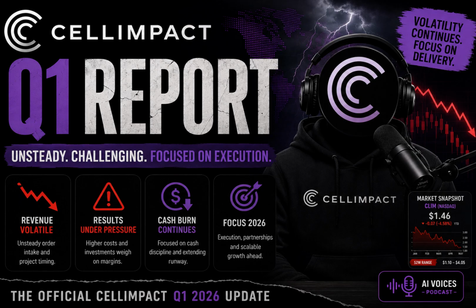It is. They uncoupled the payment for the preparatory engineering from the payment for the physical flow plates. And by doing so, they traded a frozen 18 million SEK contract for an immediate liquid 6 million SEK cash injection. And the brilliance of it is that they didn't even lose the client. The report explicitly notes they still have a shared ambition to deliver the actual flow plates at the original scale eventually. They just restructured the timeline to ensure Cellimpact actually survives long enough to make that delivery.